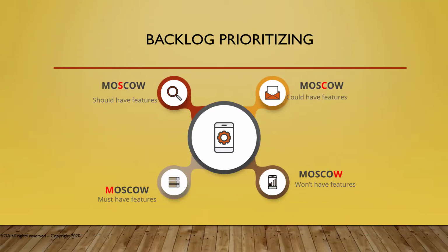The product backlog generally comprises a set of business requirements, which, if not prioritized, might cause inefficiencies down the line. The product owner lays out the priority of the must-have features, which are usually considered the MVP, or minimum viable product, while the remaining features are being worked on. After that, should-have features then follow, and could-have, and won't-have.